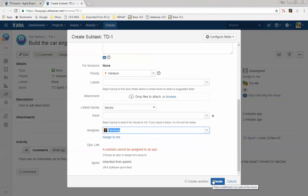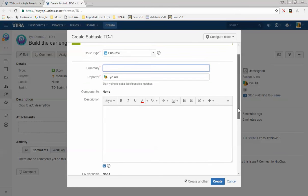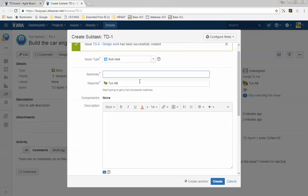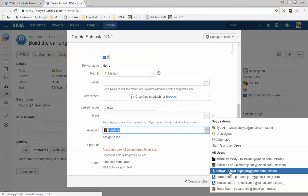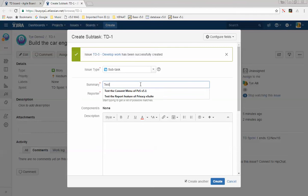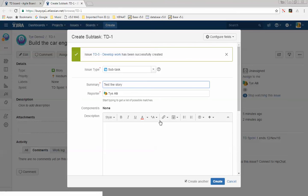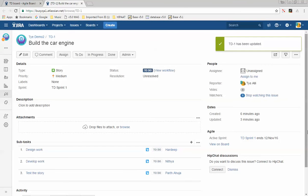To create another sub-task quickly, press the Create Another button — it creates the first sub-task and immediately opens another form. The second sub-task could be Develop — add a description and assign it to someone else, for example Nithya. The third sub-task could be Test — add a description and assign it to, for example, Path. Once done, uncheck the Create Another box and press Create.